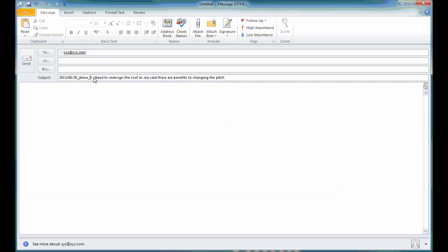The first part, before the colon, is the identifier. In this example, the naming convention for the identifier is the day the team started talking about the task, followed by the initials of the team member that started the email thread, followed by a sequence number for the particular email thread that the person started that day. Of course, use whatever naming convention you want to use.